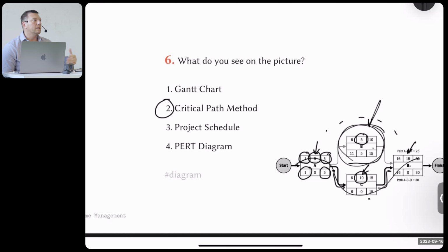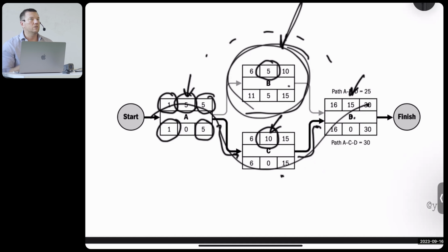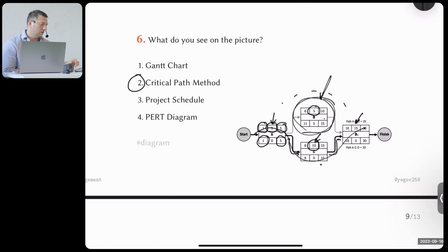Write down 10 activities, 10 things that need to be done. This is going to be your homework. For each activity, you define the duration, you define dependencies between them, you define who depends on who, in which situation, what are the lags. The lags means, like I said, the distance which you may waste, this time you can wait, and then try to draw this diagram. Try to define which is the critical path. It should be simple, but at least once you must do it to understand what it is.